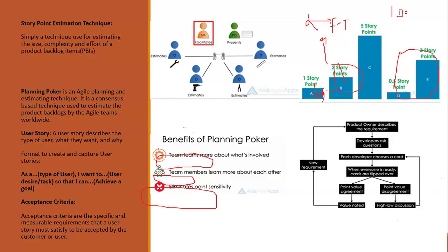He will give you his reason. The team will look at it and say whether it is wise or not. If the team feels that it's not wise, they will say no. Majority carries the vote. They agree and do the same way. The second person, you ask that person also why they did that. They will give you their reasons, right? Until you arrive at an agreement.